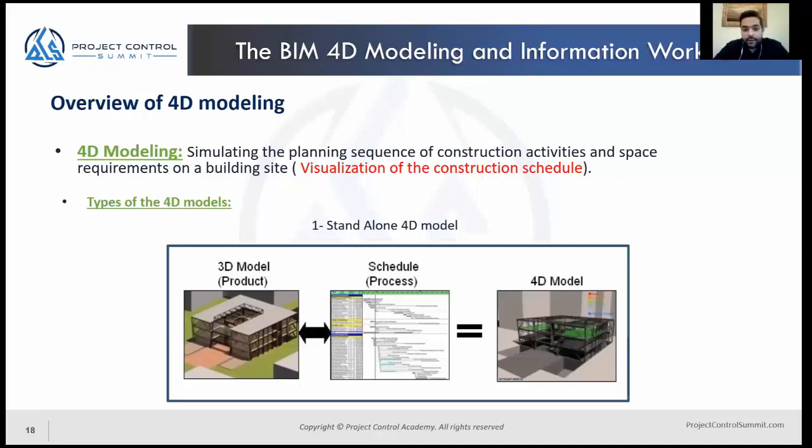Let's go through the types of 4D modeling. First type is standalone 4D modeling. We have one 3D model and one schedule. When we link each task in the schedule with the corresponding element in the 3D model, we have a single 4D model. That's the standard.